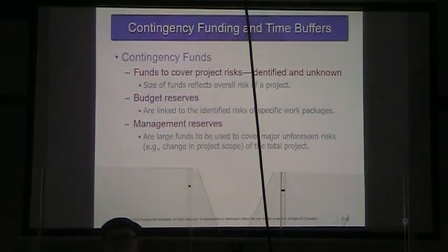Our budget reserves, well, we have reserves that we link to our identified risks in specific work packages. Right?